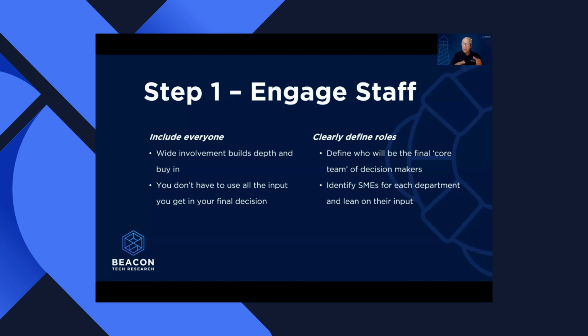So defining your team, you should have clearly defined roles, and you will have a core team of 3, 4, or 5 people, depending upon the size of your organization. It could be as few as 2, but don't make it 1. You're going to be in trouble.